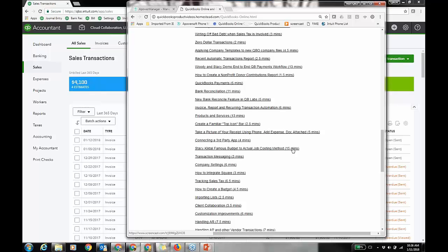But you can create budgets per job or project, and then there's a budget to actual report. So as you tag expenses and costs to the job, and you start in revenue and start invoicing against the estimate, you're going to start seeing your budget to actual, quote-unquote, estimate to actual fill out. But it just requires a lot of management to get it right and set up correctly. So it's not for the faint of heart, is what I'm saying.